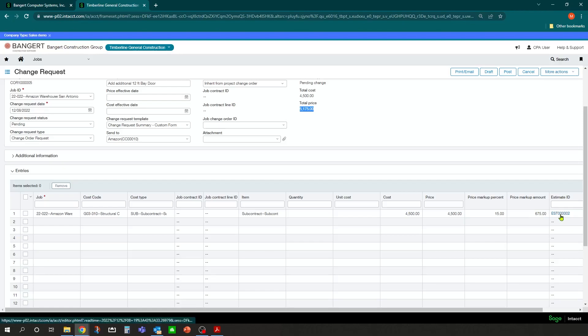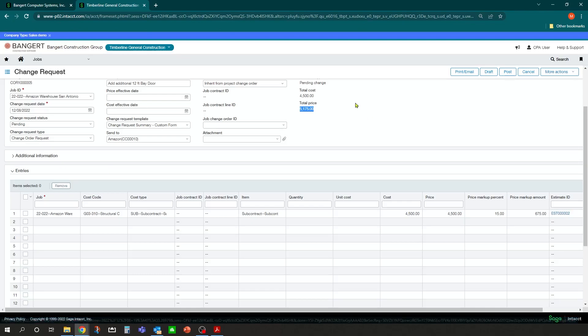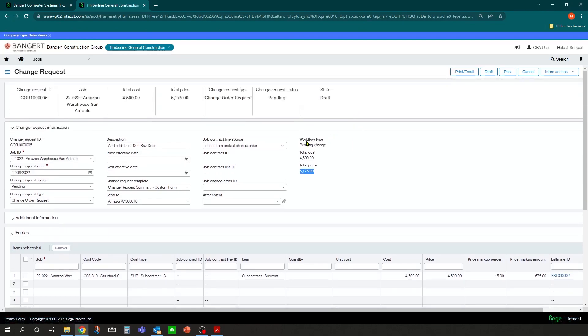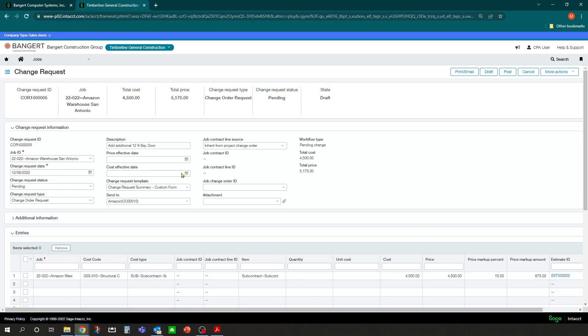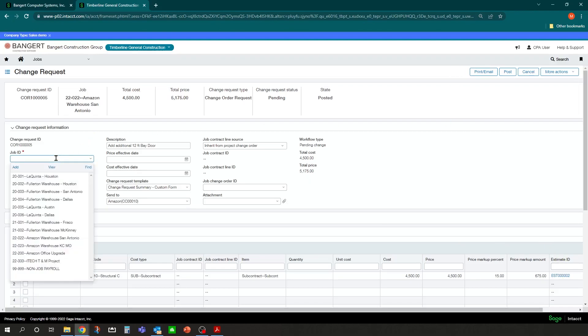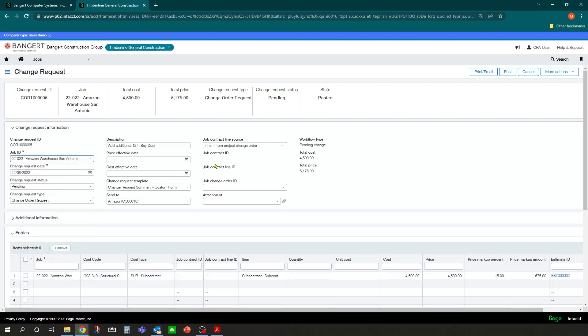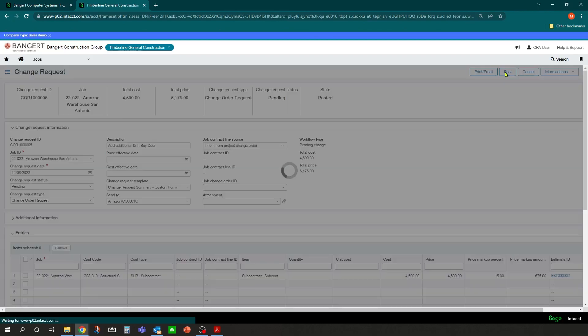So let's go ahead and leave that. And then it's going to show you the primary estimated cost budget that's associated with this project. And based on our workflow type, it will update that estimate accordingly. So as of right now, it's not approved. It's a pending stage. So basically that will not affect the estimated cost at this point. So I will then go ahead and post this in the system under post.